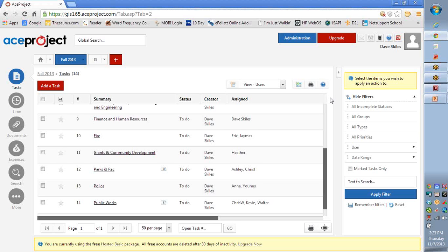So for Parks and Recreation, I'm just going to throw our budget out, and this is just for the one person that is going. With travel and expenses, it will most likely come to about $3,000, maybe a little over. Again, we laid it out the exact same way that everyone else did, accounting for airfare, hotel, meals, the car rental, and cost of labor at about $30 per hour for whoever goes and does the interview.